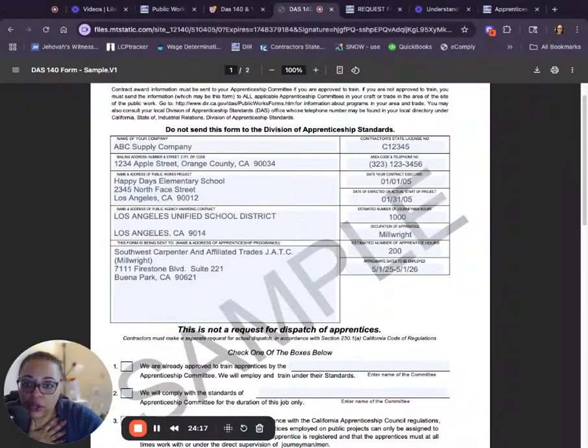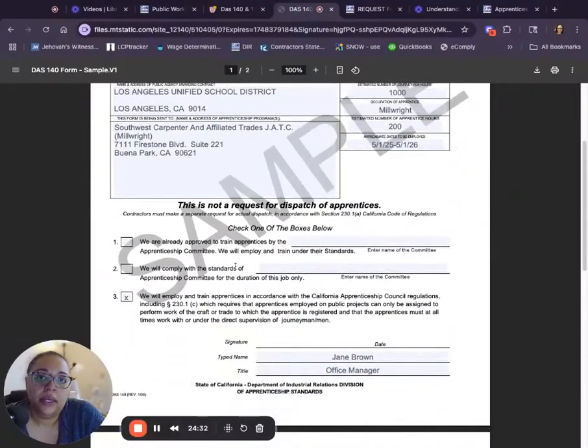If our client, good old ABC Supply Company, doesn't tell us they're on the project till they're done, get it in writing. That is not our fault. We will still submit it. We can put down for paperwork purposes, or we can just call the union and let them know, hey, I sent over a form. My sub was late telling me that they needed to get it in. Or we just file it and it's late and oh well. But get it in writing why it's late.